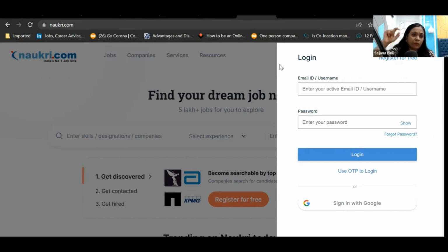I pick up one crucial test scenario from every flow. From every flow, I pick up just one and ask the business user to test it so that they can approve it. Got it? So don't take the same test cases that your testing team has prepared and send them to business users. You will go mad. Then you will never get a sign off from them because they will be busy testing such a huge pack. When you give your business users such a huge pack to test, they will never get it done.